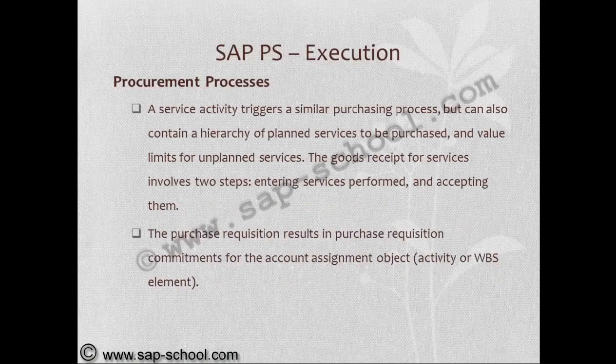A service activity triggers a similar purchasing process but can also contain a hierarchy of planned services to be purchased and value limits for unplanned services. The goods received for services involves two steps: entering services performed and accepting them. The purchase requisition results in purchase requisition commitments for the account assignment object.